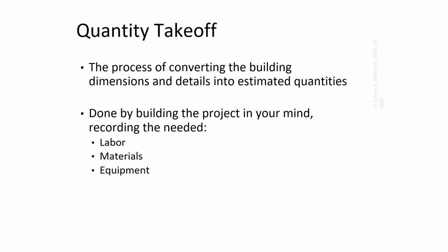And I always like to do this, guys. A lot of subcontractors laugh at me, but during my pre-construction meetings, I'll say, Bob, walk me through, like I'm an idiot, how you're going to do this work. And people will say, okay, well, we're going to pull the 12-2. No, I say, like I'm an idiot, like I know nothing. I'm talking about, where do you guys meet in the morning? Well, we meet at the shop. Okay, start me there. We're going to have 6 people. We usually have a pre-construction meeting about what we're going to do that day. We get in our different vehicles, then we drive to the job site.